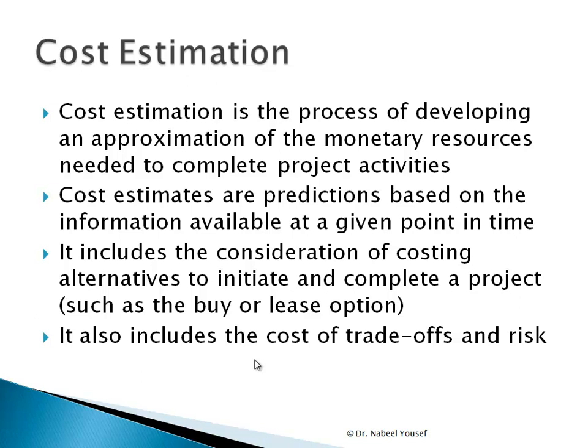So let's start with the first process, the cost estimation, which we said before is the process of developing an approximation of the monetary resources needed to complete project activities. We know that cost estimates are predictions based on the information available at a given point in time. So at the beginning of the project, maybe you will not have enough information to make a good prediction or a good cost estimation, but as the project advances, we'll get more information and it will be more accurate.